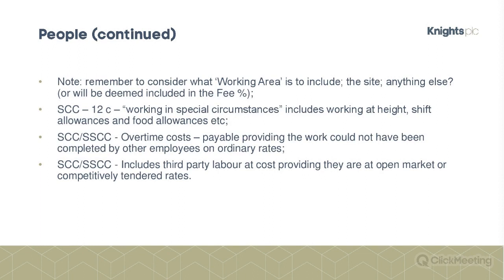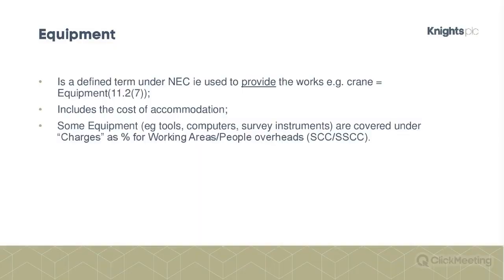So it includes the cost of third-party labour at cost, but again, checks and balances: it's at cost, but on open market rates or competitively tendered rates, which is fair to both parties.